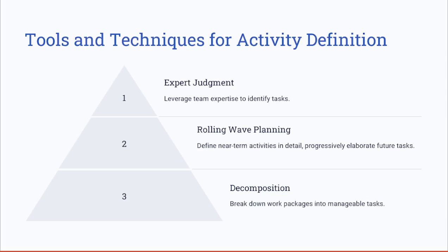When it comes to rolling wave planning, it is particularly useful in dynamic projects where you define the near-term activities in detail while allowing future tasks to evolve. So based on the evolvement of these activities, you may break down and estimate each of them. This is a very important concept that you might face in the exam, called rolling wave planning. So you don't have to plan everything upfront.